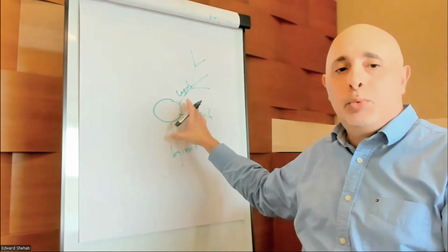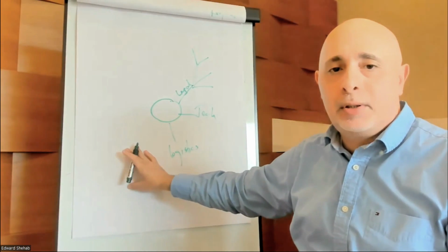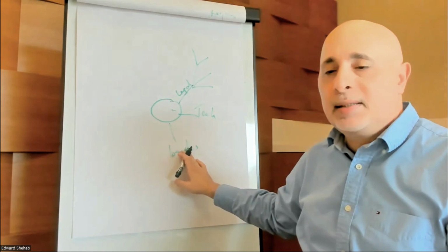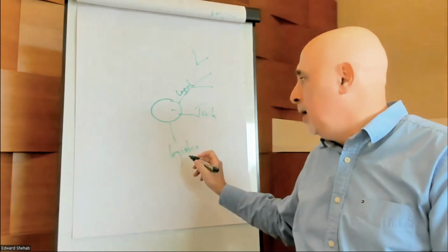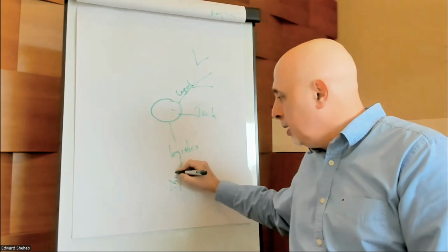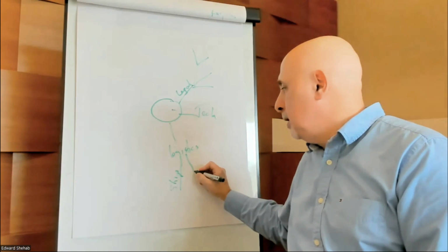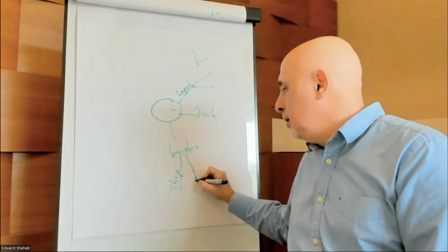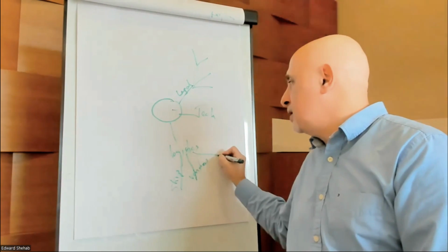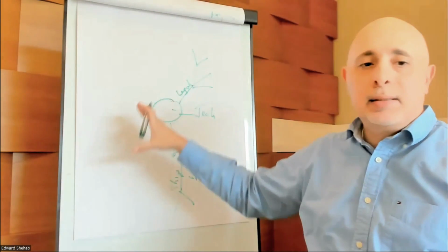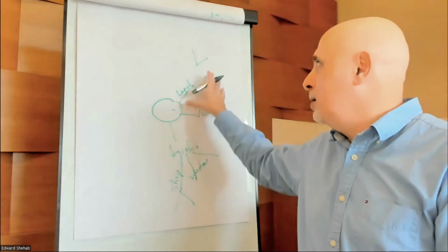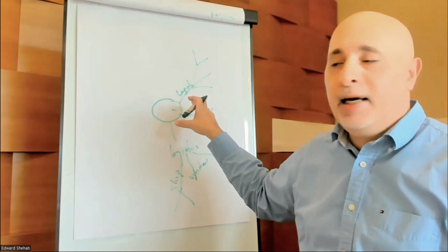But what you're doing is you're taking the whole project here, and then you're dissecting it into smaller pieces, almost like a work breakdown structure. And then in logistics, you can talk about shipping related. So you write shipping, and then you might talk about, let's say, vendors. And then you can write about something else. And what you're seeing is you're creating a nice spider web. I don't know if it's a spider web, but you're getting a lot of these branches. They're like nerve endings, right?